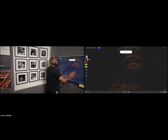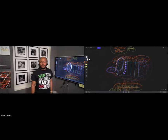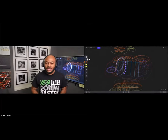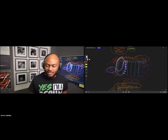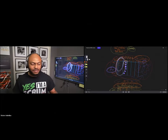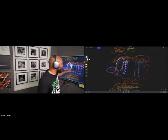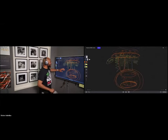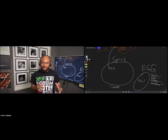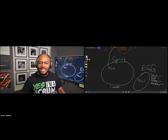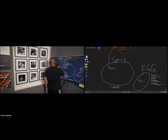The daily standup is an opportunity for developers to say, 'I'm struggling with this story — I don't have all the skills I need,' or 'There's something missing, I need to ask additional questions,' or 'I need to work with someone who can help me complete it.' That's what the daily standup is for. In our program, we do a daily standup at the beginning of every call for 15 minutes, simulating the ceremony that happens within the team and organization.